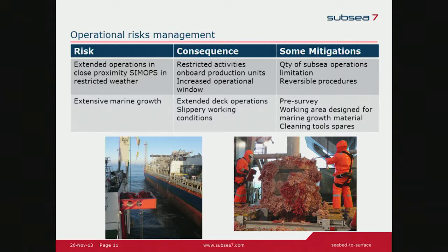So mitigation for that is to know exactly what to wait for, and so having done a pre-survey, and then plan our operations and especially the schedule according to that. But also the working area to be designed for having this kind of material laying around, and also cleaning tools to be planned with a lot of spares, because they do break off easily.